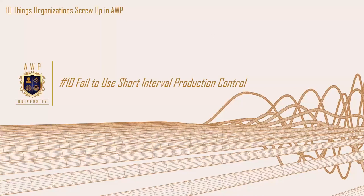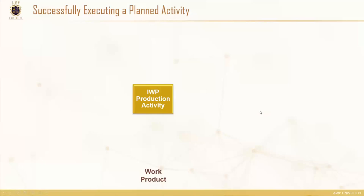The first one: fail to use short interval production control. What is short interval production control? Often within the advanced work packaging and work face planning world, we tend to forget that there's life beyond AWP. The AWP itself is not the end of the planning activity. That craft task grouping is maybe dropped down to 600 to 1,000 hours — or whatever makes sense as we work on a new definition for AWP type and size.